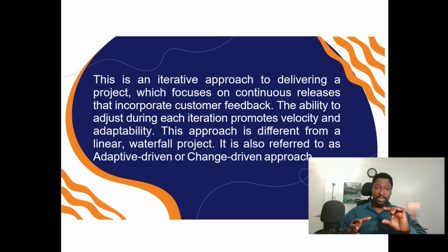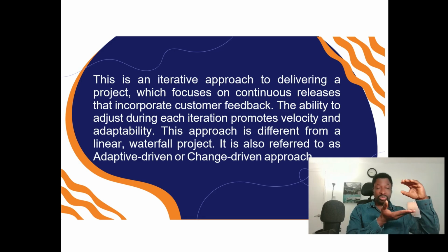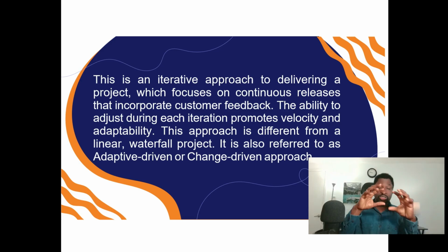In Scrum, we use what is called a sprint. For the team to work on the sprint, you have this project scope, and from the project scope, we are able to have some themes. From themes, we divide our work into Epics, and from Epics we are able to generate what are called user stories. So the team works on user stories during the sprint. We have these user stories, and based on prioritization, we select some user stories that the team can complete during a sprint.